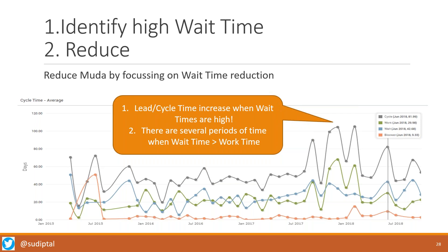You can see from this example that whenever wait times increase, lead times obviously increase correspondingly — if cards are spending a lot of time waiting, the lead time on those cards keeps increasing. So higher lead times than what you might mentally expect often indicates more wait time than you would like in the system.